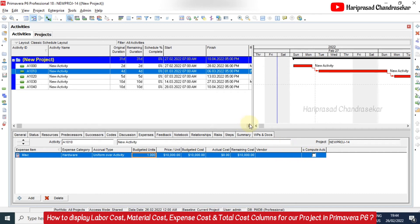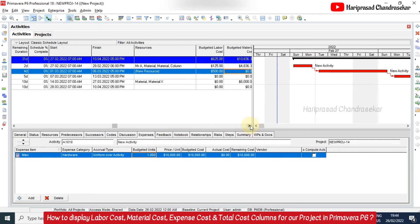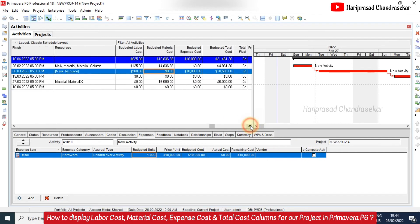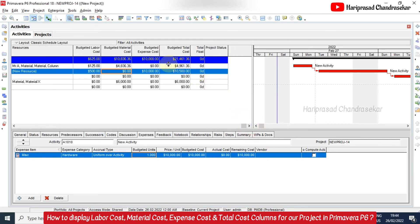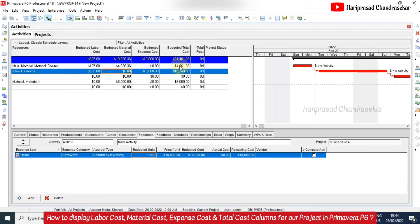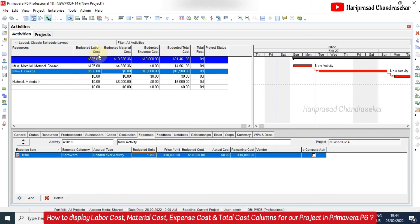So now you can see here, this budgeted expense cost is also populated with ten thousand dollars. So totally now budgeted total cost for our project is twenty one thousand four hundred sixty one point three six dollars. So like this we can use multiple columns in our project, where we can display labor cost, material cost, expense cost and the total cost also. So this is for budget.